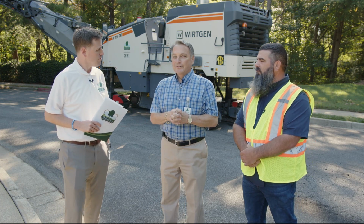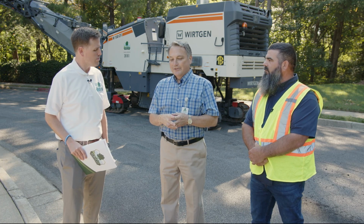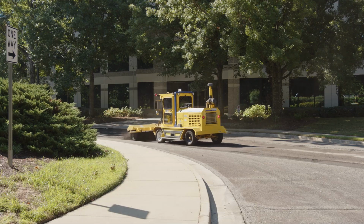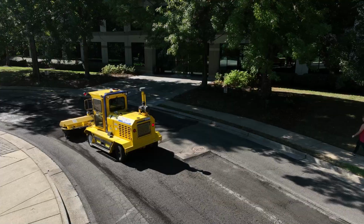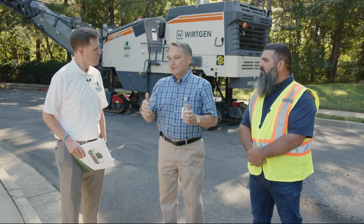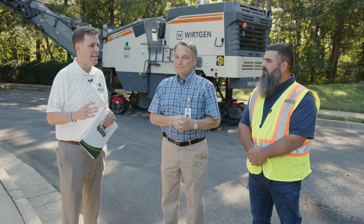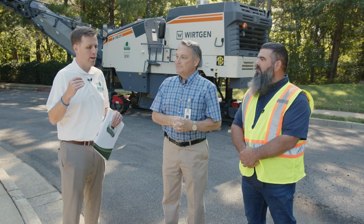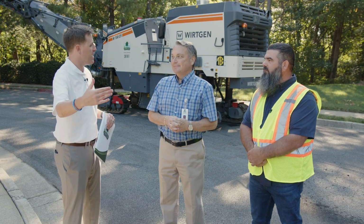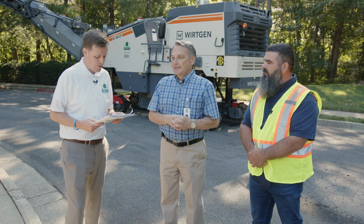And what we hold off on is if we have to do any edge milling, typically we hold off on around the curb. We'll hold off on the edge milling and just do the deep patching because it's a flush patch when you get finished with it, and it's not as intrusive. And then we'll wait and do the edge milling closer to the time that the contractor is going to actually come in and resurface. Makes perfect sense, and that's why I imagine there's that period where a resident might think, well, they left unfinished work here, right. But actually it's not. You're just waiting for that next phase, and you're kind of ahead of schedule in a lot of ways. Right. Excellent. All right, good to know. That answers that question, something I never knew.